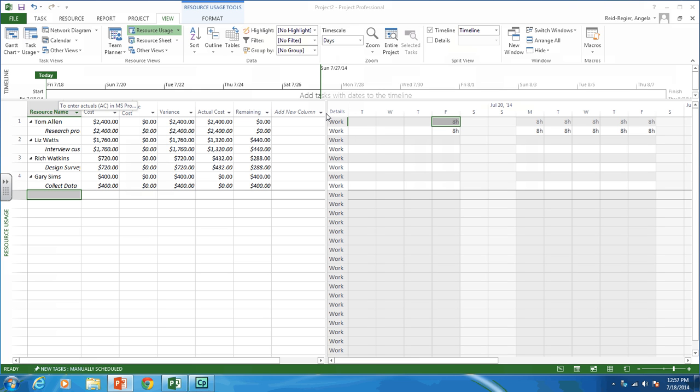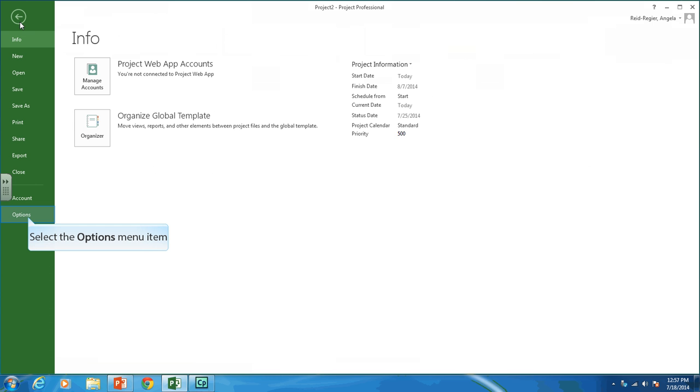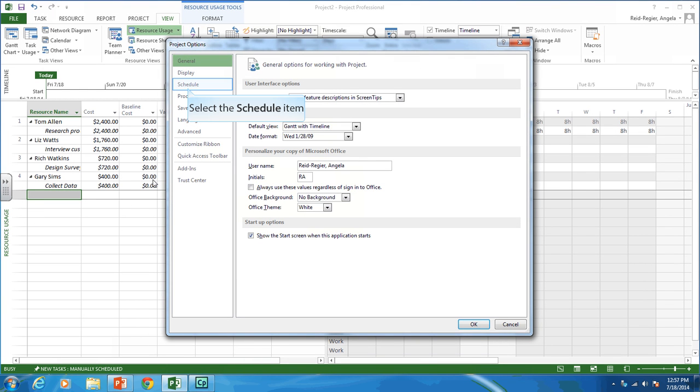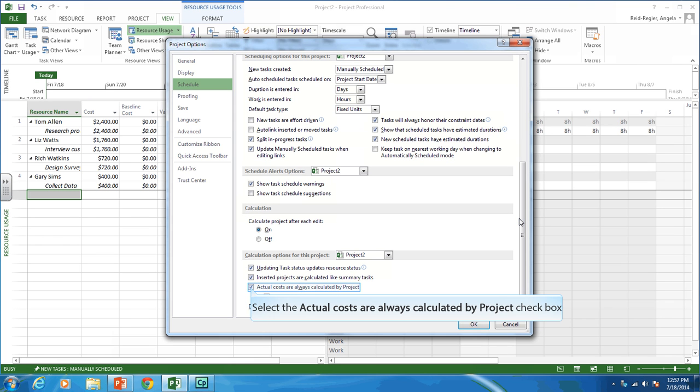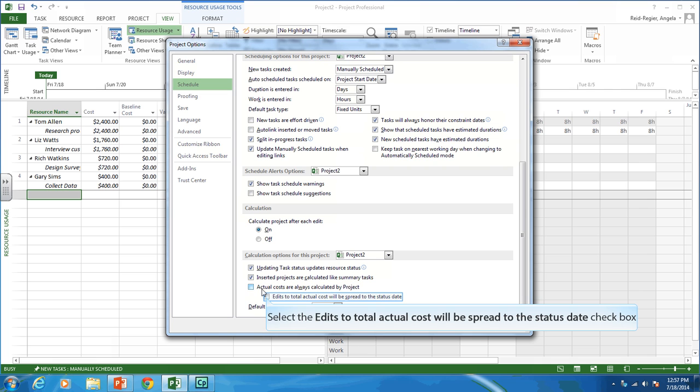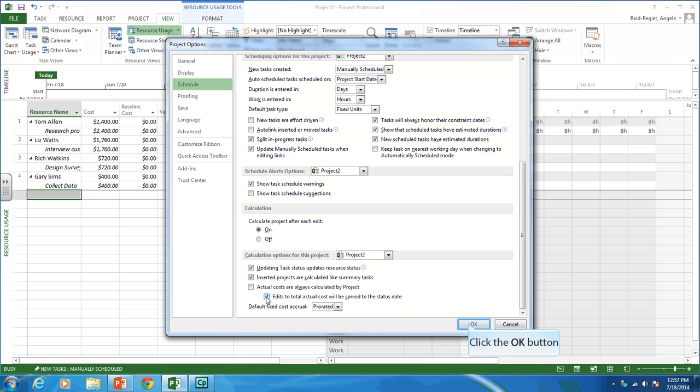For question three, we want to create work overview reports. But before we do that, let's add some actuals, because Microsoft Project assumes actuals equal earned value by default — and we know that never happens. To add actuals, go to the File tab, Options, Schedule, and scroll down. Uncheck 'actual costs are always calculated by project,' and check 'edits to total actual cost will be spread to the status date.' Click OK.